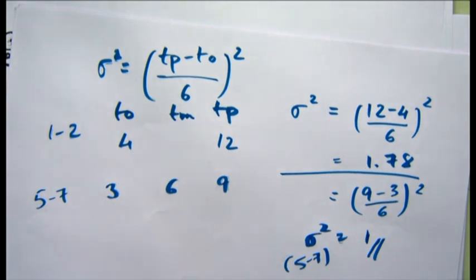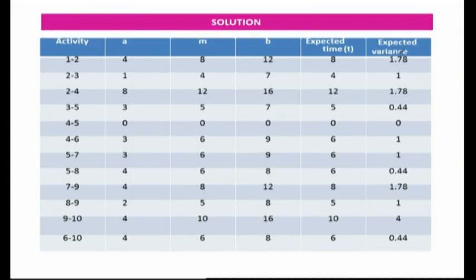Looking at the resultant table, we can see the expected variance for each activity from (1,2) to (6,10): 1.78, 1, 1.78, 0.44, and so on. We have now learned how to calculate the estimated time using one formula and the expected variance using another formula.